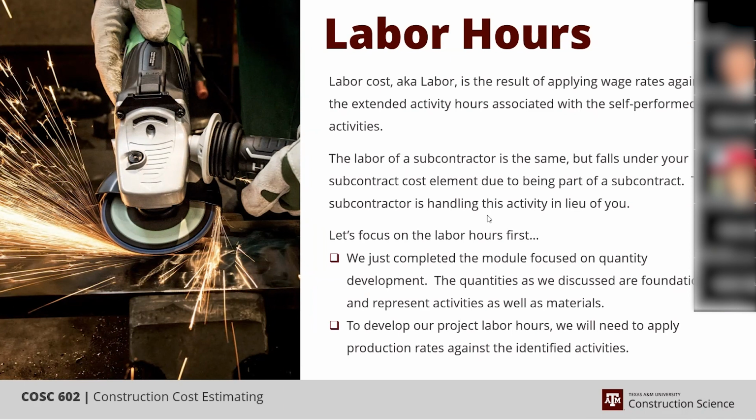Meanwhile, if we take off a wall, an interior wall of a building, that square footage can apply to the sheetrock, can apply to the stud work, unless you convert it to board feet, can apply to the tape and floating, texturing, and the painting, and the insulation that may go in there. So that MTO applies to several things whenever you take it off.